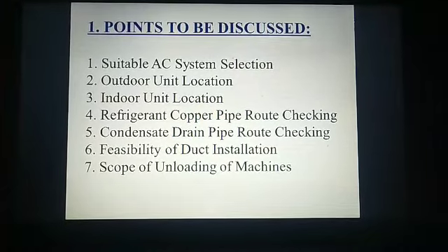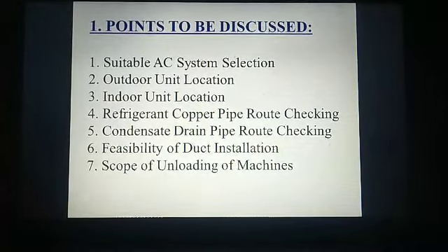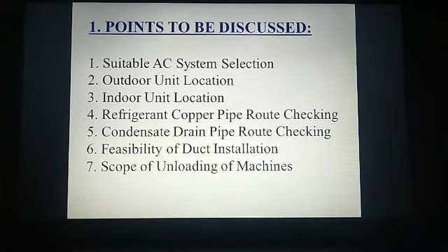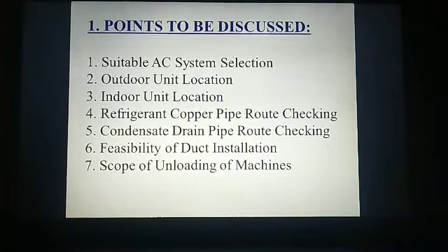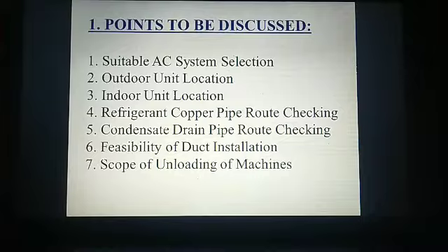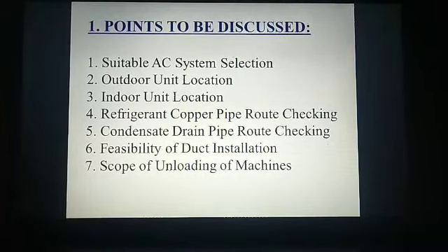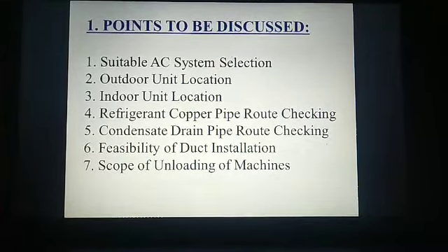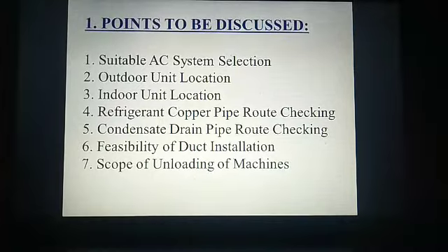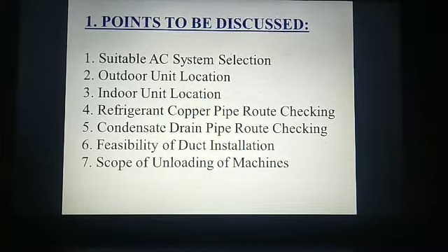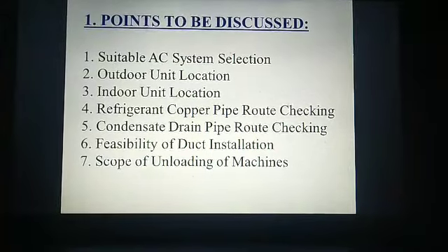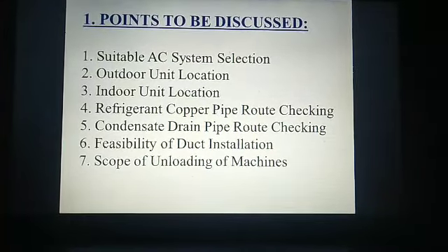Friends, these are the points to be checked during the site visit. Suitable AC system selection, outdoor unit location, indoor unit location, refrigerant copper pipe route checking, condensate drain pipe route checking, feasibility of duct installation, scope of unloading of machine. We are going to discuss each point in detail.